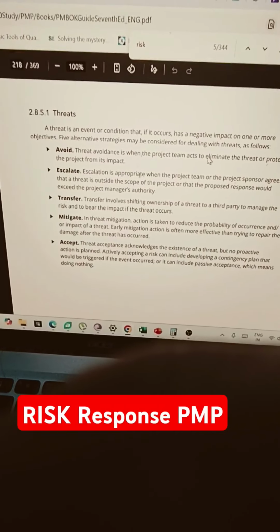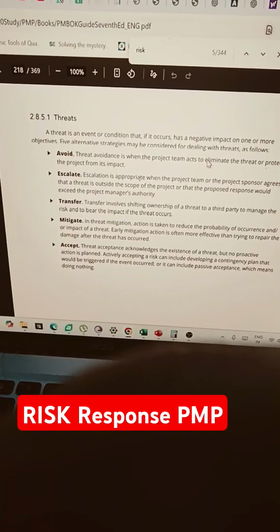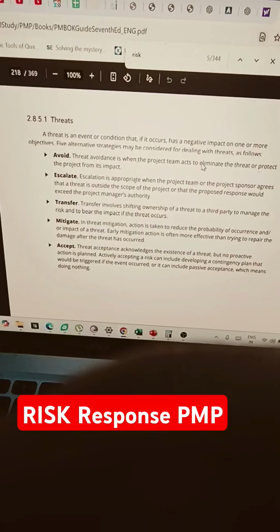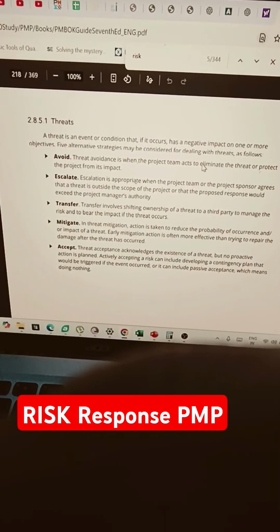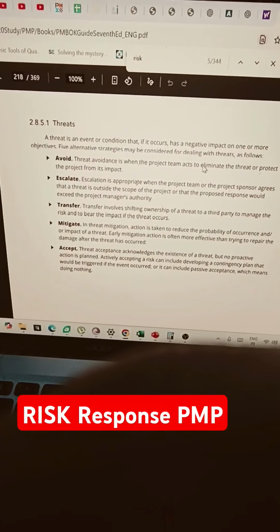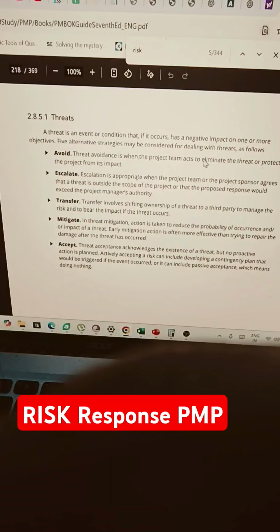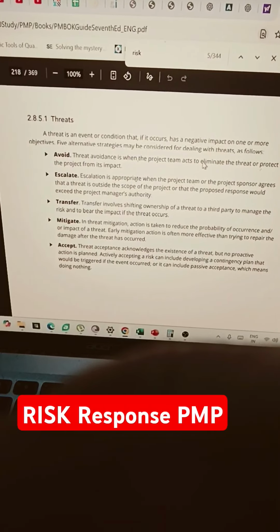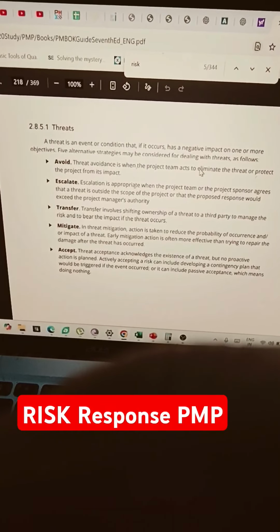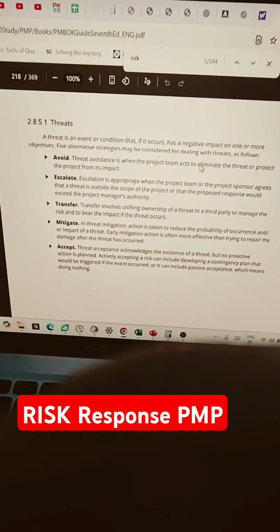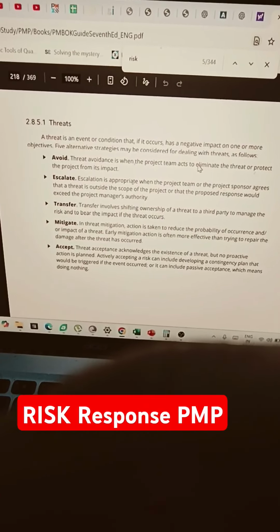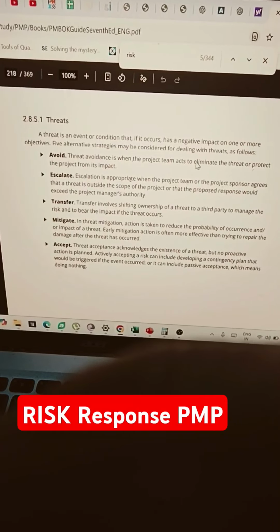leadership. Transferring of the risk is one of the strategies which involves cost, which means that we will hire some third party which is going to bear the risk. For example, if we are transporting some goods which are of high value and the possibility is that they are going to be damaged during the transportation, in order to minimize the financial loss, we will hire a third party for transferring the risk. Just like an example, we are taking insurance for it.